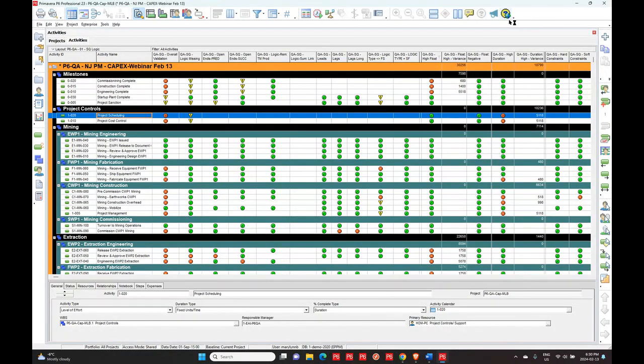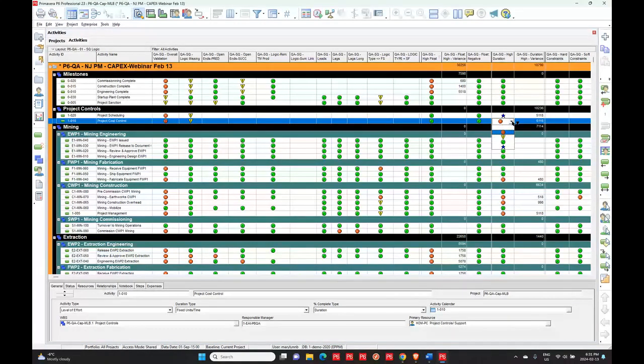I can simply go into where the check results, in other words, where this red icon is sitting, and I can click in there and set that as a blue star. Basically, what that does is it tells the software, okay, there was an issue there. I looked at it and I'm okay with it. For whatever the reason, because of whatever check it is, I know it's failing the check, but that's okay. It's been checked, it's been addressed.